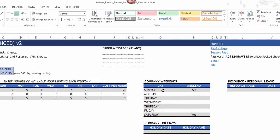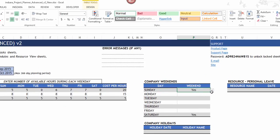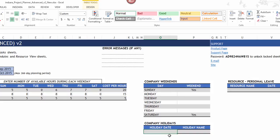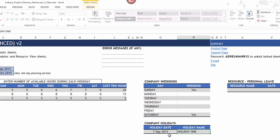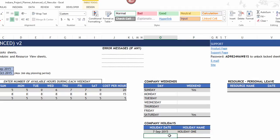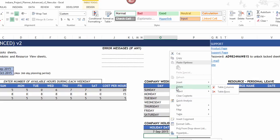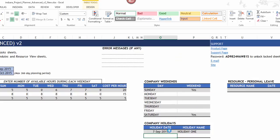The next important piece is company weekends. By default Saturday and Sunday are selected, but if you want Tuesdays to also be weekends you can choose yes and that day gets added as a weekend. For company holidays, you can enter a specific date and give it a name. To delete a holiday row, right-click and choose 'Delete Table Rows.'